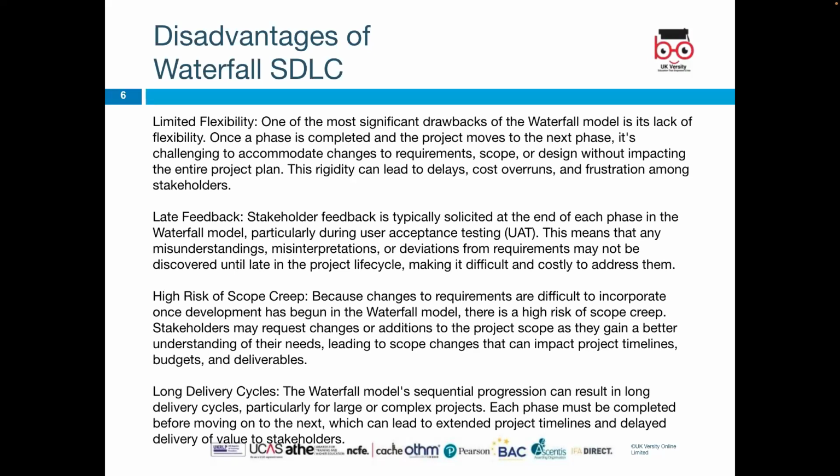Late feedback. Stakeholder feedback is typically solicited at the end of each phase in the waterfall model, particularly during user acceptance testing, UAT, that we looked at previously. This means that any misunderstanding, misinterpretation, or deviation from requirements may not be discovered until late in the project lifecycle, making it difficult and costly to address them.